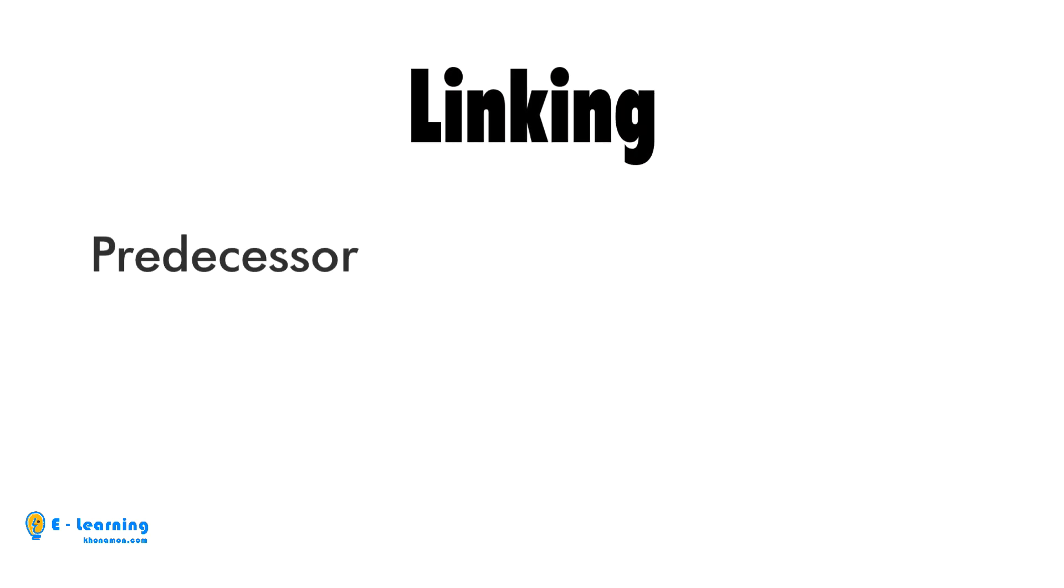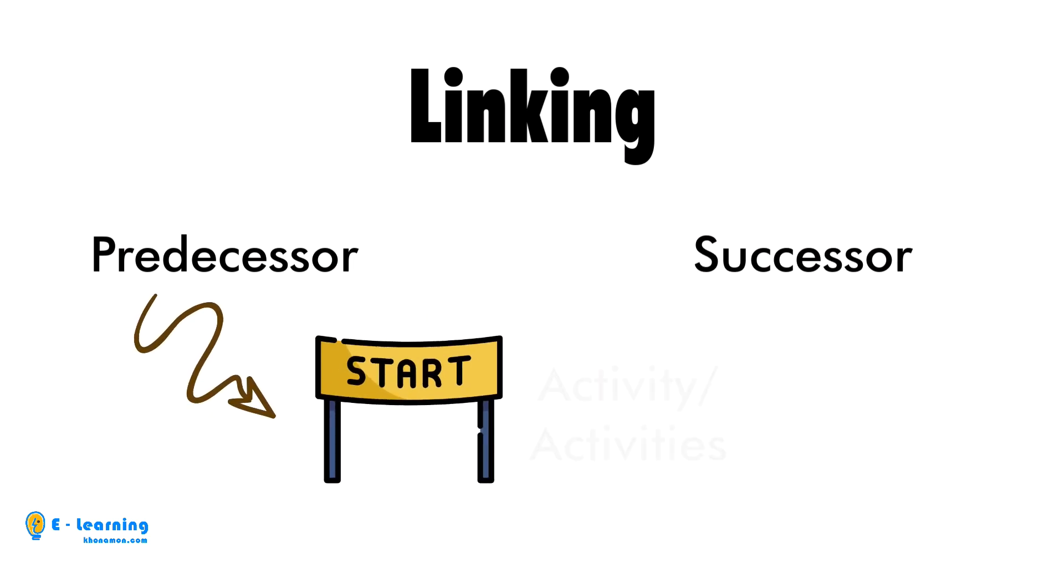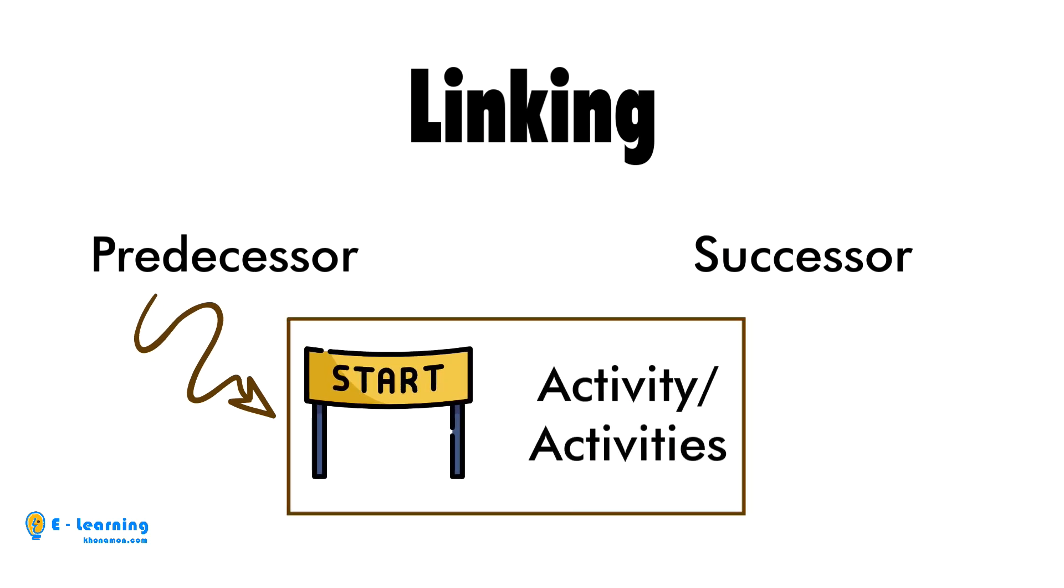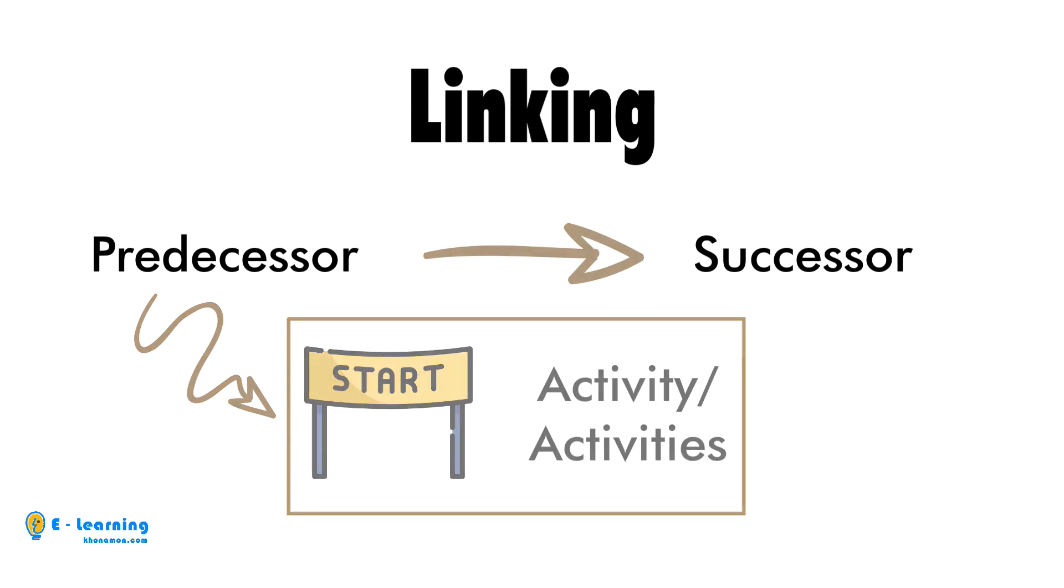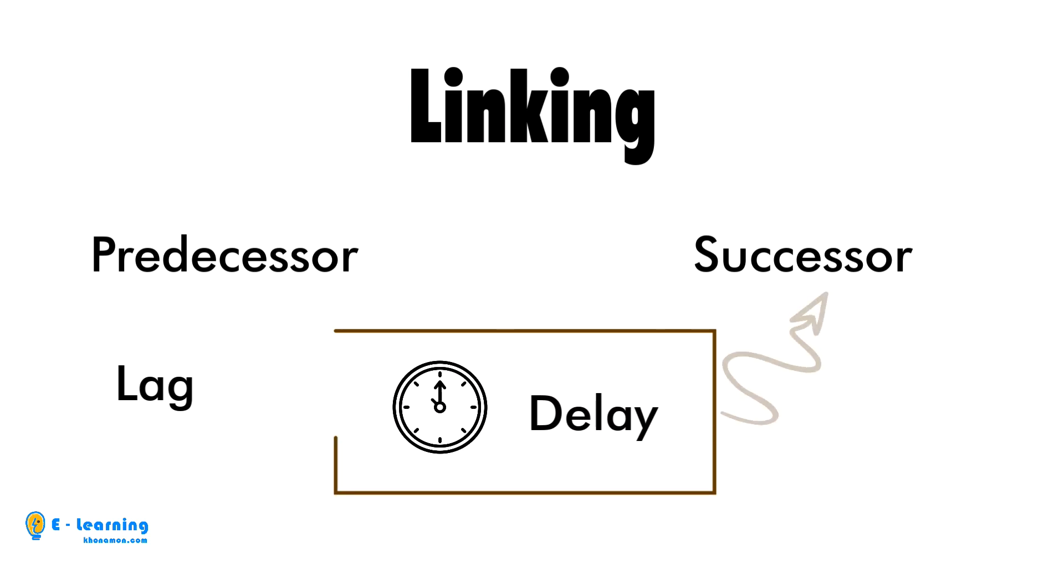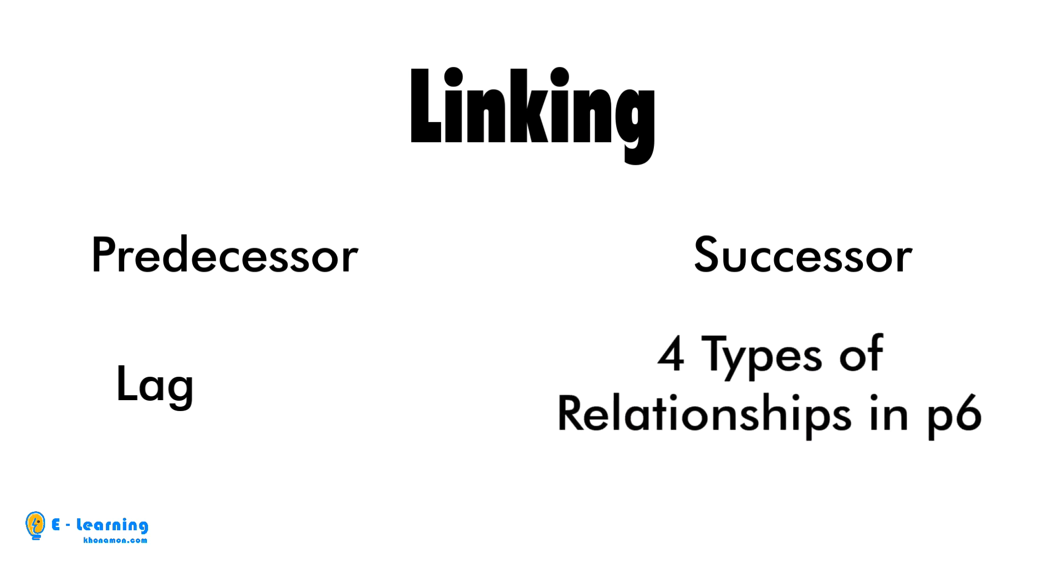Linking activities requires being familiar with predecessor and successor terms. Predecessor activity rules the start date of the activity or activities. Successor activity is ruled by the predecessor activity or activities. Lag is delay of the successor activity. There are four types of relationships in P6.